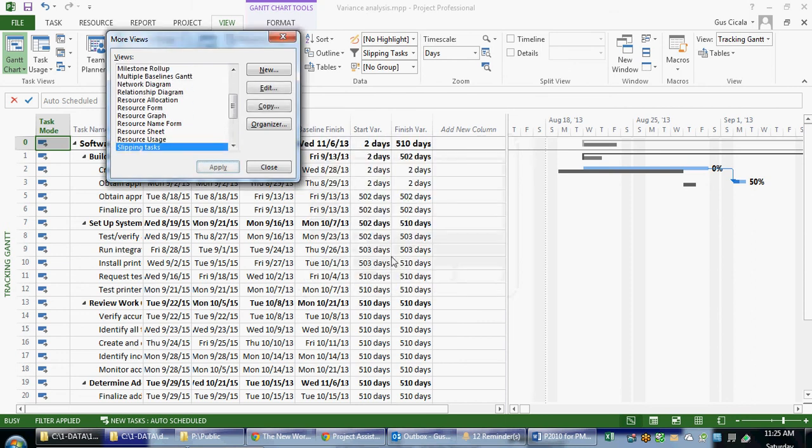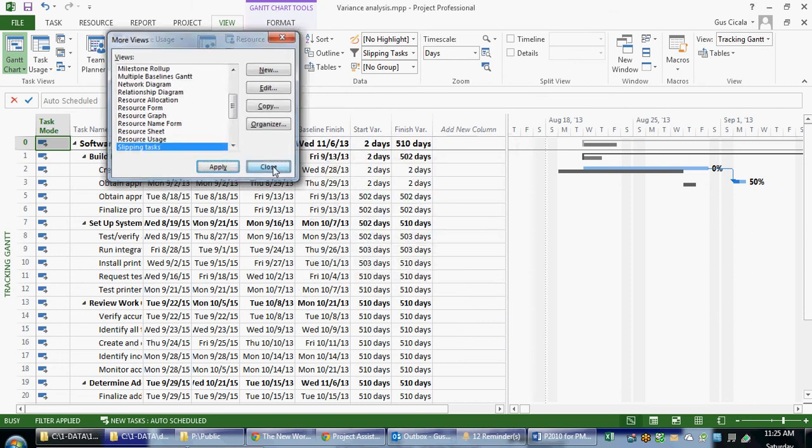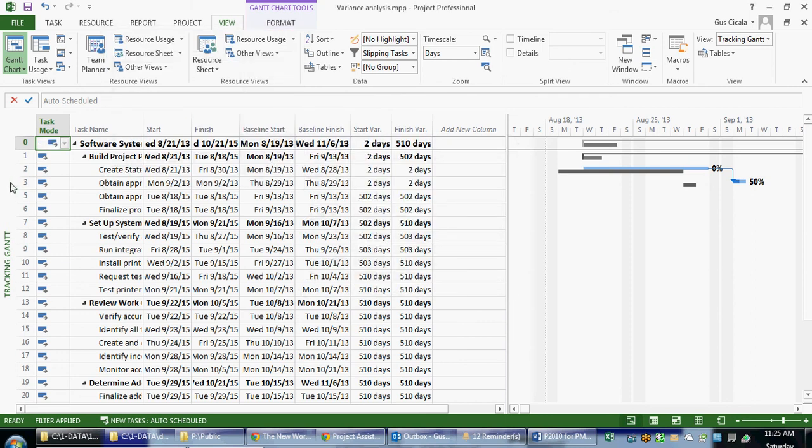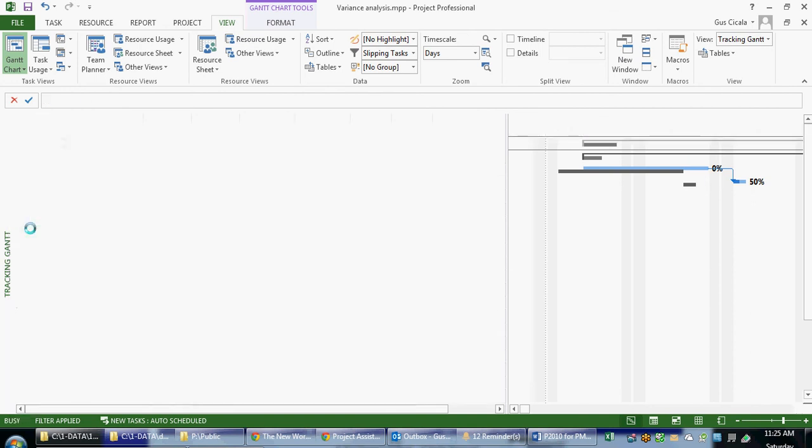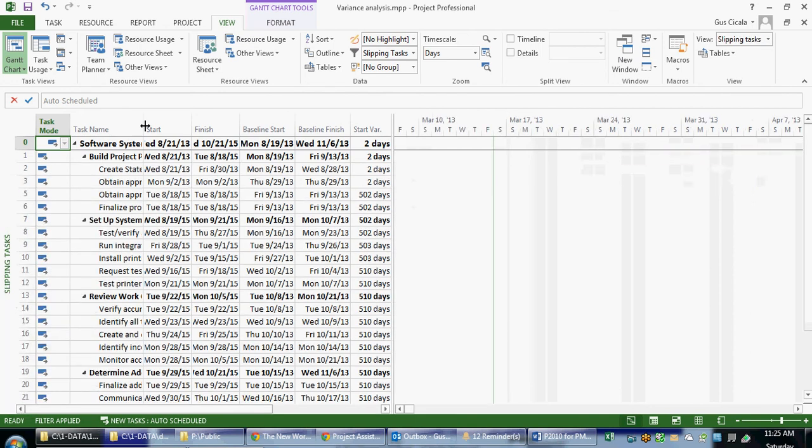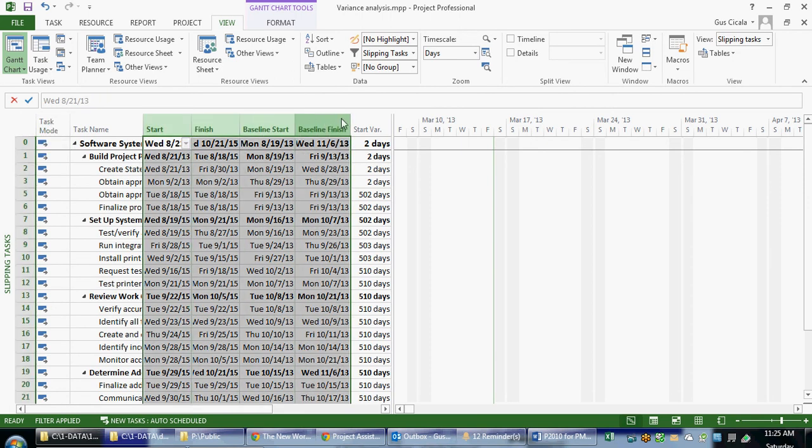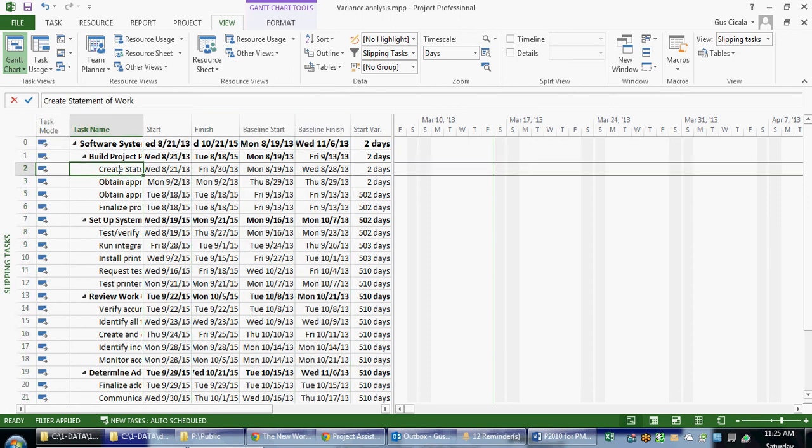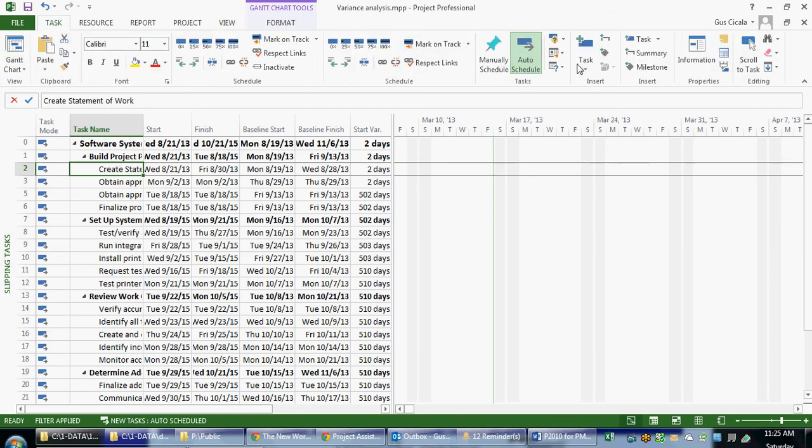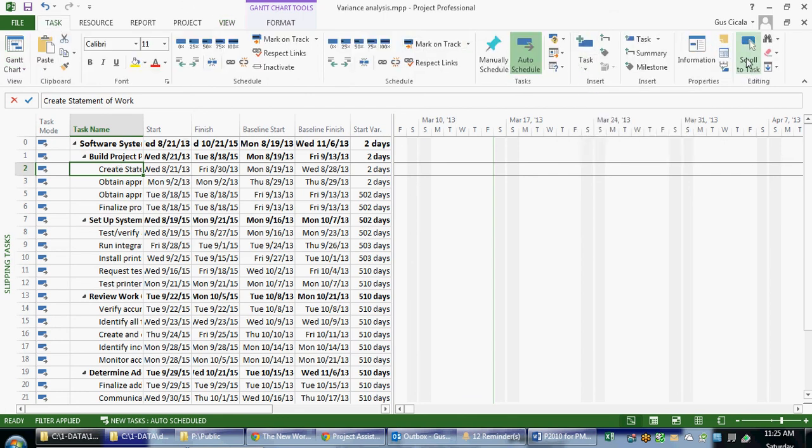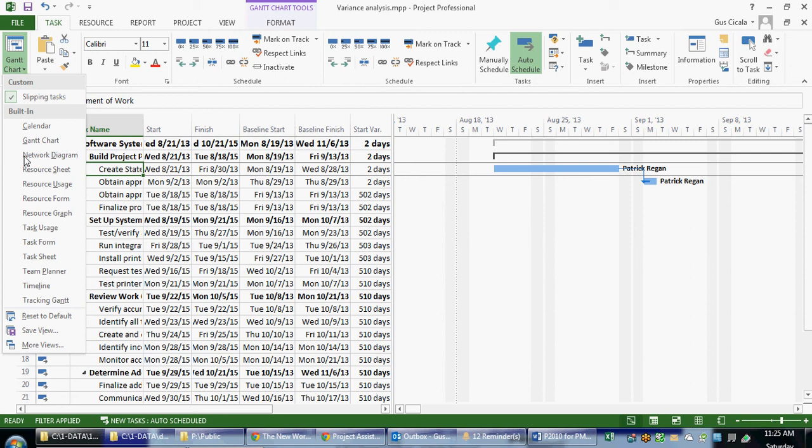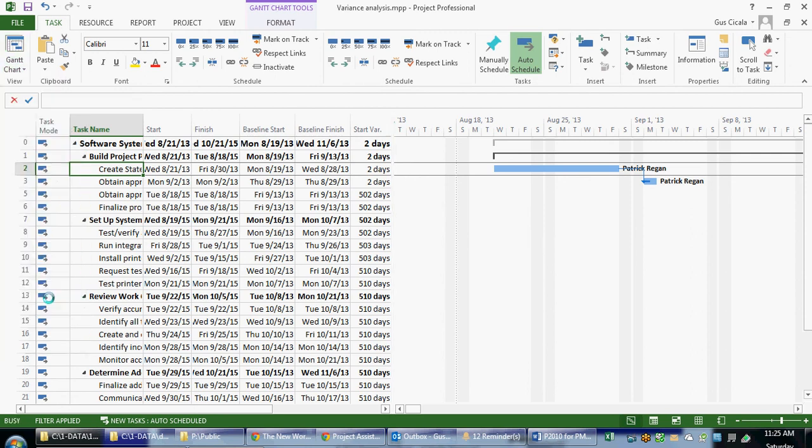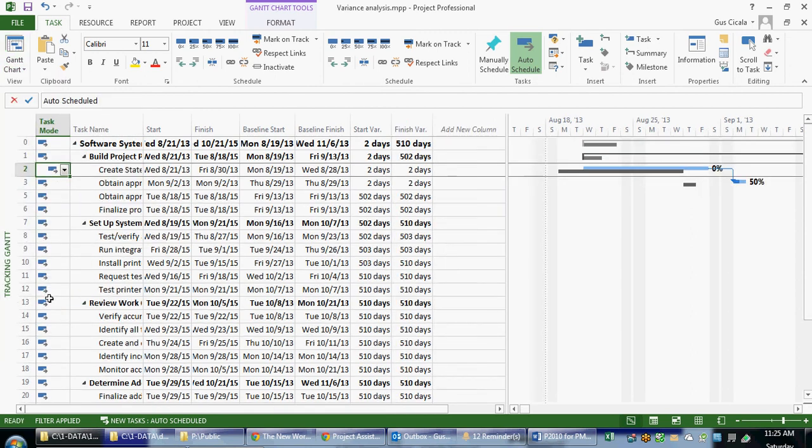I can say OK. So now when I choose my menu, for example, right mouse clicking on my views, I can see my Slipping Tasks filter. Notice that it applied the columns or the fields for the Variance table, and it showed me the Slipping Tasks. I would also remind you that on the task menu, there's something called Scroll to Tasks, and that will bring my current tasks into view. I can also apply the Tracking Gantt, which will give me a visual cue of how these tasks are doing.